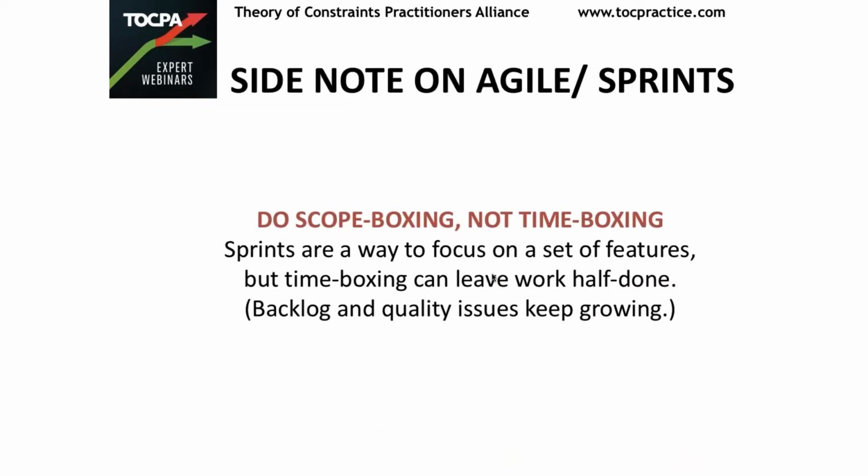But the part that I have seen that creates havoc in agile and sprints, the part that is very destructive, is time boxing. Right? So what happens with time boxing is you say that no matter what, every sprint is going to take 4 weeks or 6 weeks. And in that time pressure, you leave features and functionality half done, or you cause people to panic to meet the deadline. And you cause resources to start spreading thin, because instead of focusing on one feature at a time, you say, in this timeline, we've got to finish 5 features, so let me also take some resource that is sitting idle and put that on feature number 3, and that ends up spreading the resources thin, and ultimately it hurts everyone, right?